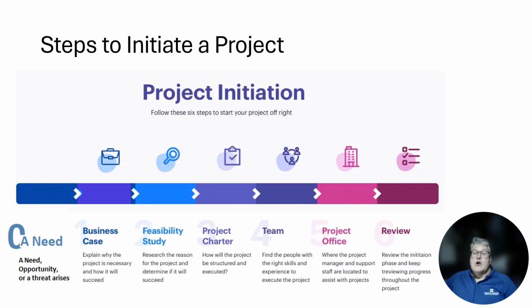Next, a project charter is developed, which means that someone has signed off and said, yes, we need to do this. We looked at the feasibility study and it looks like we should do this project. After that, a team is developed, a project manager is assigned, and a project sponsor from executive management generally sponsors the project, helps facilitate it, and provides resources.